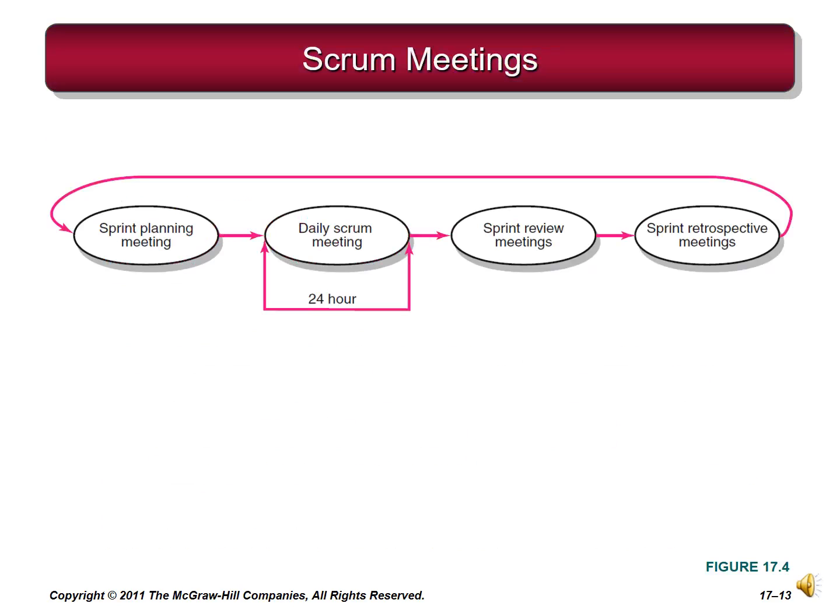The Scrum process uses a series of coordinated meetings to manage the development process. The sprint meeting is at the start of each sprint. The product owner and development team negotiate which product backlog items the team will attempt this sprint. The product owner is responsible for identifying which features are most important, and the team is responsible for determining what is possible within that sprint.